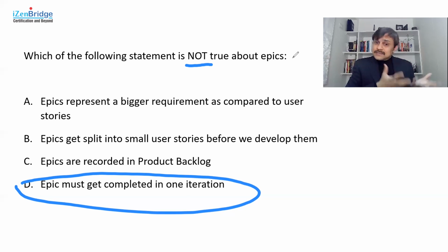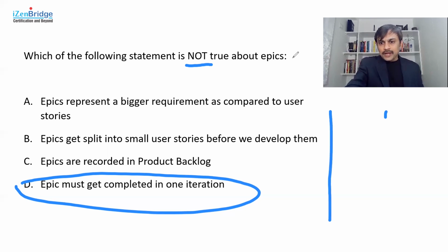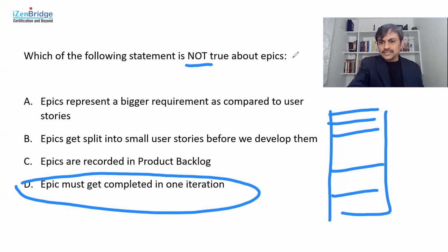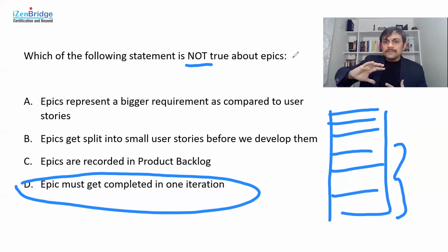Now, epic is a part of the product backlog. Usually you see the depiction of a product backlog where items at the top are small, and as you go down, you start seeing larger items. The depiction represents the items which are not yet a priority. The whole idea of the agile way of working with requirements is progressive elaboration. We should not be elaborating things in advance. We should do it just in time, because we are discovering and learning about the requirements incrementally.